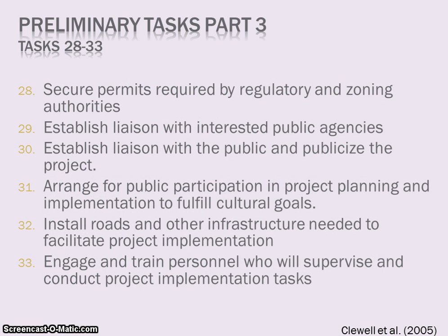Under Step 2, preliminary tasks, tasks 28 through 33 focus on gaining permits as needed for any construction activities, establishing working relationships and a liaison for public agencies and the public at large, public participation, infrastructure, and training.